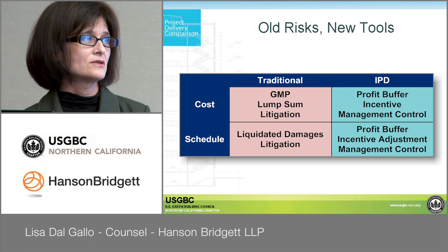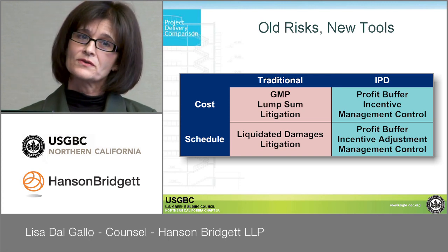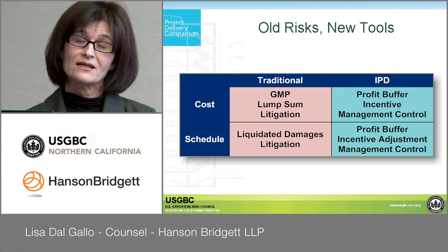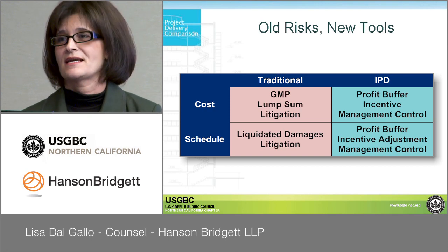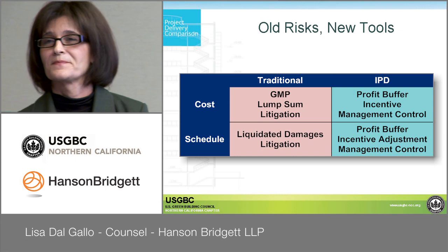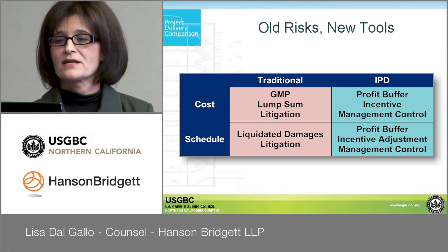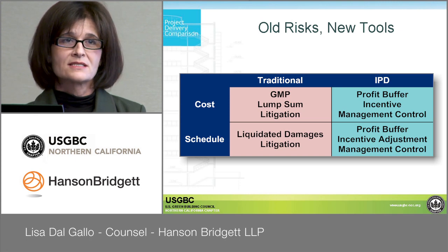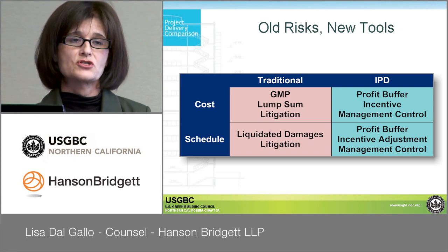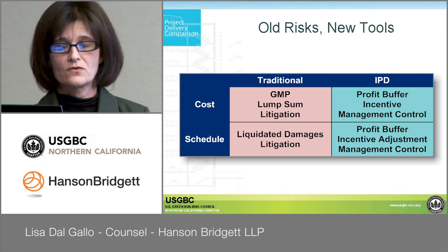Under the IPD approach, you've got people coming in early. They're collaborating together. They have a stake in the outcome. They are interested in the outcome. They are vested in the outcome. They've put a percentage of their profit at risk, and that's what's your profit, your buffer, to manage the project within that margin so that you're not going over and you're not overrunning the schedule.